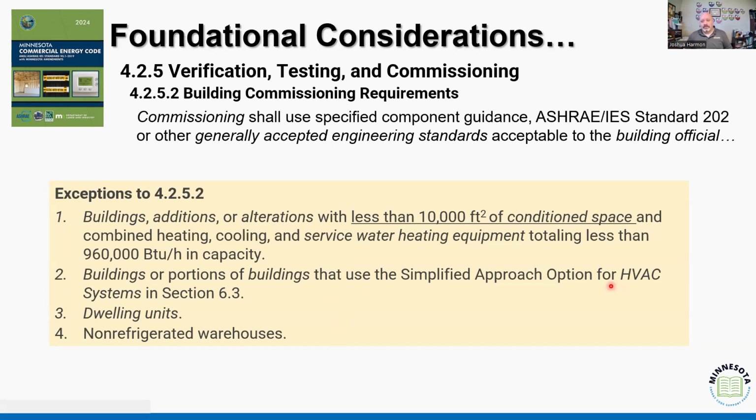And again, if something's following the simplified HVAC approach, again, we've got a simplified design. If we've got a dwelling unit, or if it's a non-refrigerated warehouse, again, it doesn't have any heating system. It's unconditioned space. There's nothing to test, right, in that context. And so again, we're looking at how are we verifying the equipment. We've done the safety inspection. Now, what is the expectation associated with the effective operation?